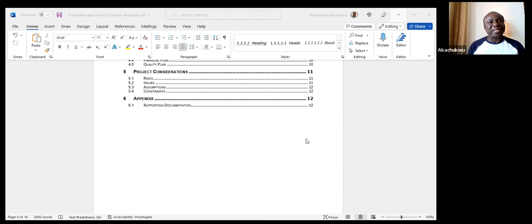So quickly, what you could do is to quickly review the document and take up sections that are not covered, and just have something you can make a reference to, get the right approval from the project management office or whoever the project sponsor is. Hey, I made an observation. I know this is a sub-project within this, but I identified it as a risk. And this is what I've done to mitigate that risk.